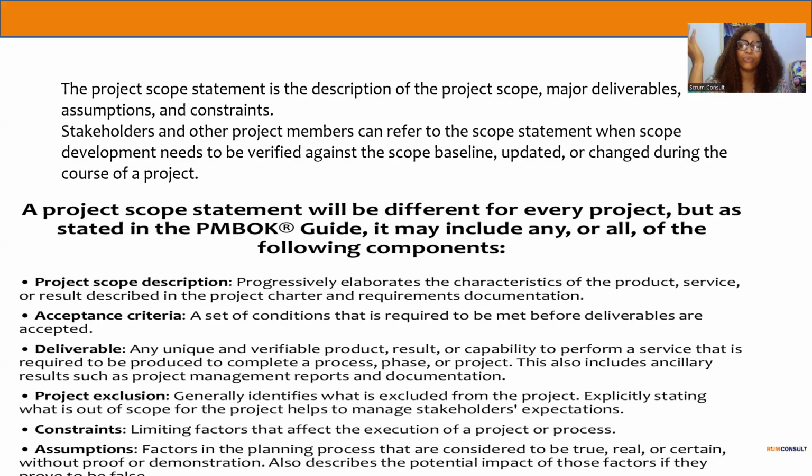Example of out of scope. Okay, what is an example? We're trying to build a 2-bedroom apartment, as a real estate development agency. We got a contract to build maybe 5 units of 2-bedroom flats. Out of scope, we are not involved in marketing. So you need to state that so that once we are finished putting up the building, the stakeholders will not expect us to start selling it off. So this is what your project covers, and this is always very good to state.